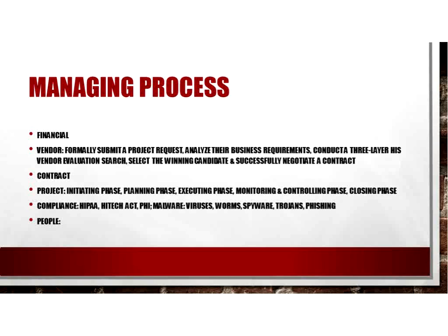And then finally, in your 4th step, you're going to select the candidate and successfully negotiate that contract. You would like to narrow down your candidates to 2 vendors in order to select the final one. This allows them to compete for your interest, and they tend to do a better job.